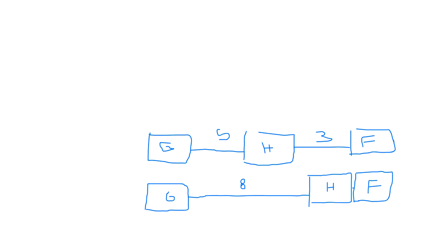The total float for task H is going to be 3 days because you cannot delay task F further. But if you are allowed to start task H earlier, and sometimes you cannot, then you can put task H here, and you can have the total float of 8 days for task H as well. But because most of the time you're not allowed to start it earlier, the total float is going to be only the 3 days, the same as the free float. Okay.